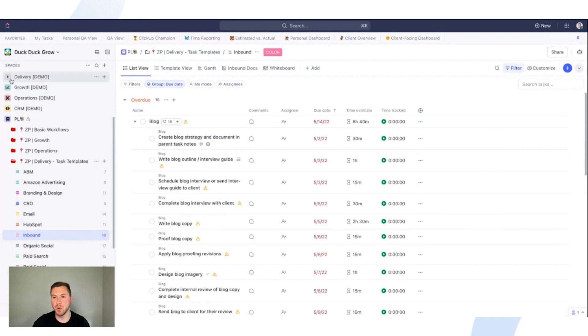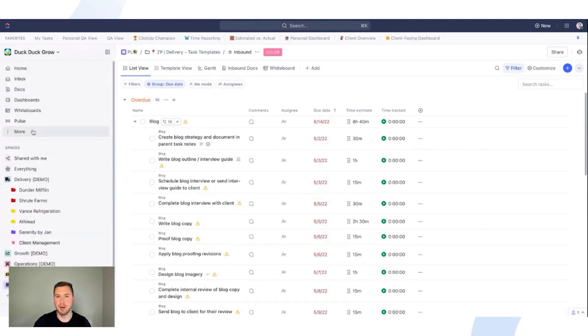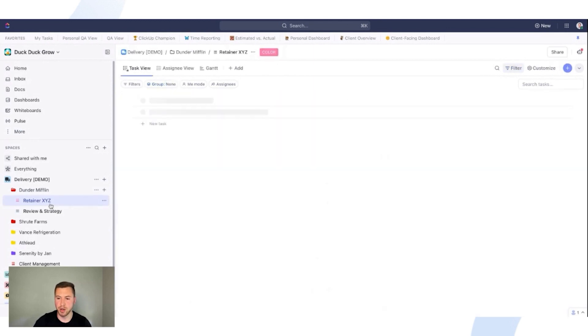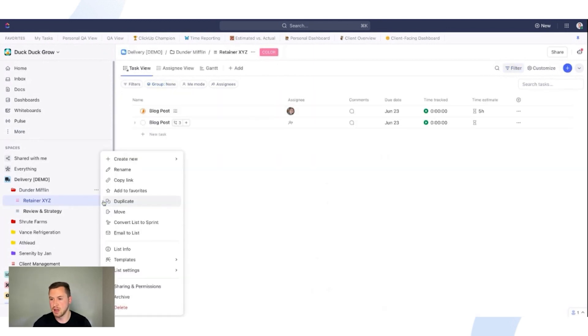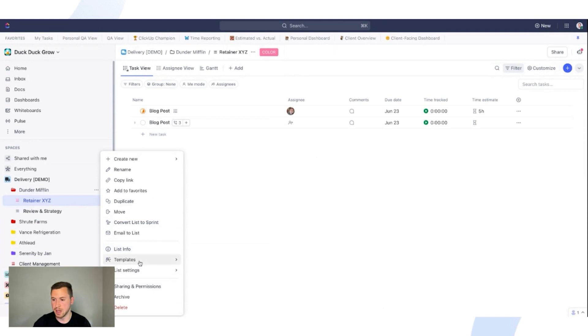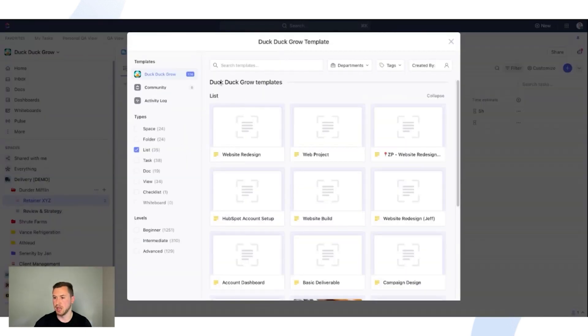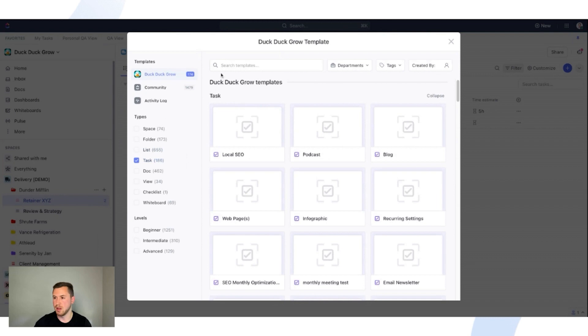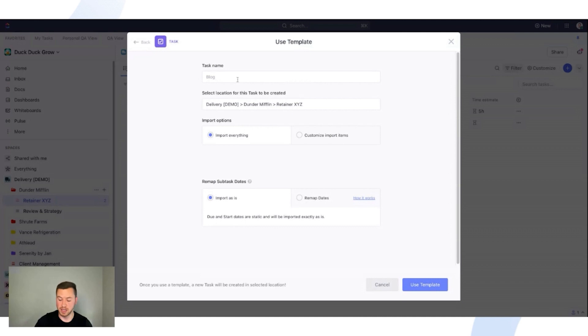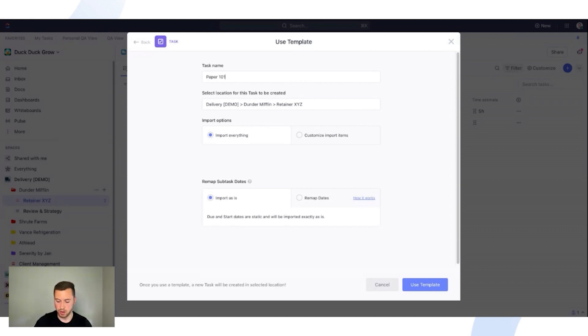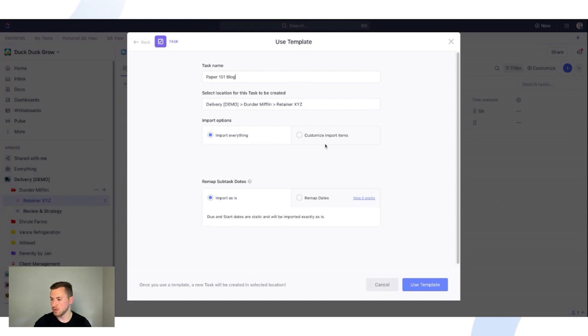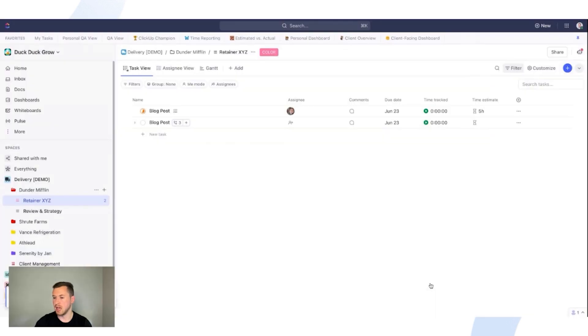And then when I want to go to deploy it, so now in this scenario, Michael Scott has requested a blog post. I can easily go to my Dunder Mifflin folder, retainer XYZ list, go into my list settings, and I'm going to go into the template center just like this, browse templates, and let's go into my task templates. And I'll type in blog, find it right there, use a template. I can rename it like this. Let's say this is paper 101, blog, and then I will go to remap dates. Again, this is due, let's say this one's due on the 30th, just like that, and I'll use my template.